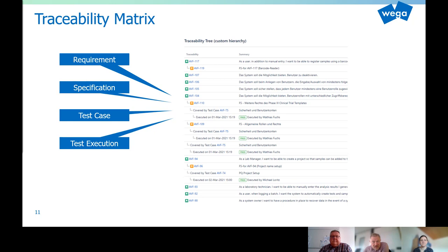We're not yet ready with all the test scripts, and that's why there are still uncovered stories. It might also be the case that no test case is required, so another mitigation has been identified for the user story according to our risk assessment. The benefit of this report is that it provides a full trace between URS, FS, CS, and test cases, and that it is always up to date because it's directly generated out of the actual data from the system. I can show you more details when I show you the live system in the follow-up session after this initial handover introduction meeting. Okay, thanks for the explanation, Matthias.